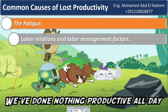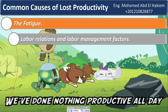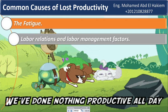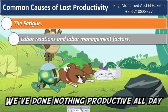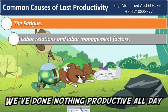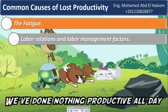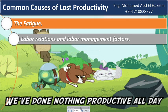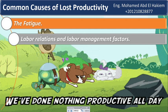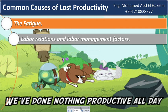Fourteen: labor relations and labor management factors. When there are union jurisdictional issues, industrial relations issues, unsafe working conditions or other safety issues, multiple evacuation alarms in existing facilities, untimely issuance of permits, access issues, etc., labor productivity may be adversely impacted in multiple ways.